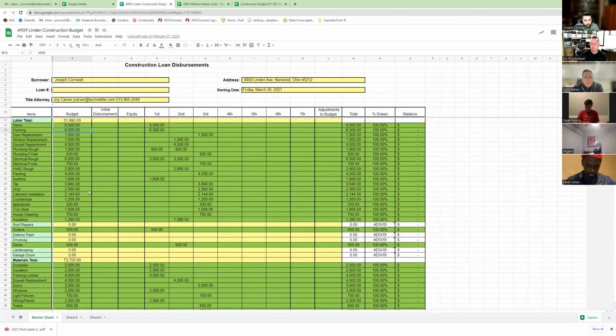But yeah, one thing I wanted to mention. Some of these things are just by the number, and what I mean by that is windows. Windows is an easy one to do by the number, right? Every property I look at, I count how many windows there are, and if there's 24 windows, and I know they're all original wood windows, 100 years old, which is the case in a lot of the buildings I buy, I know going in I'm having to replace 24 windows during my rehab.